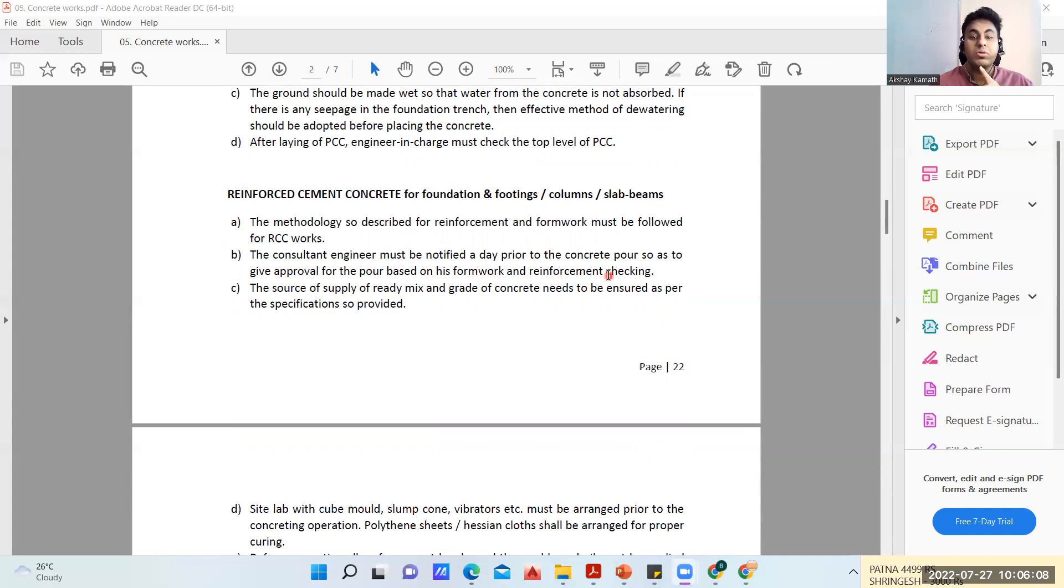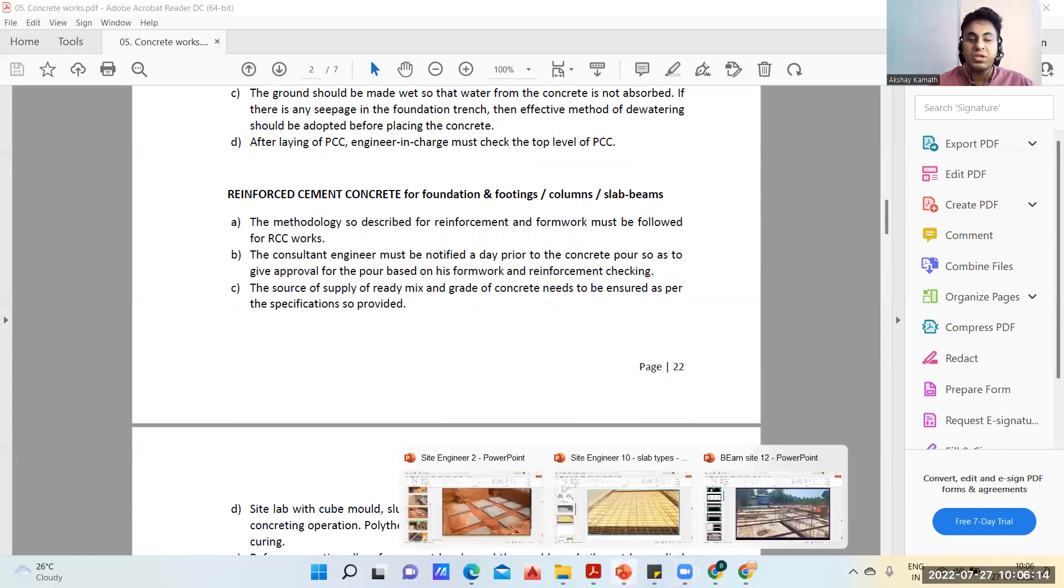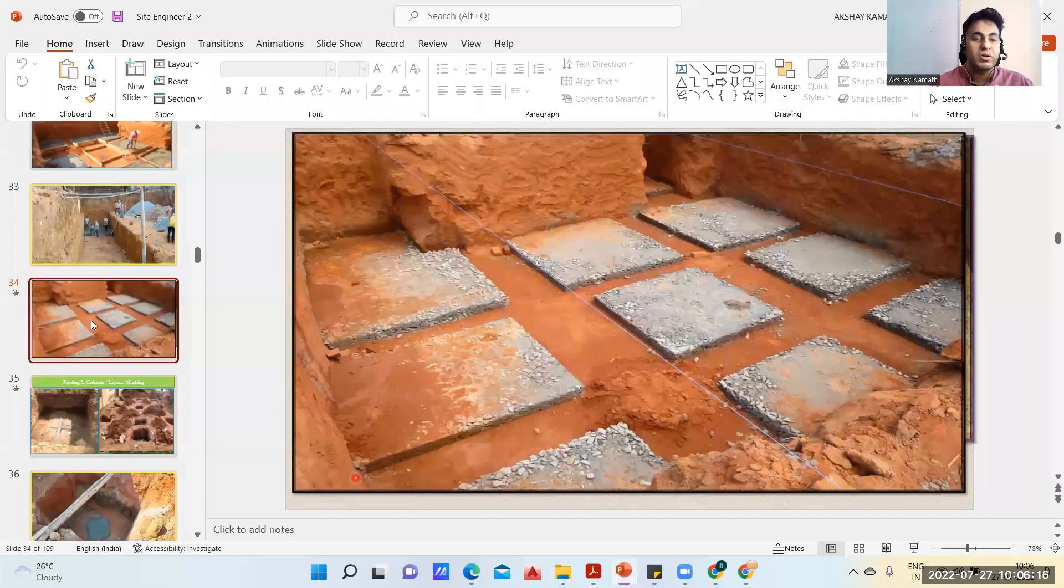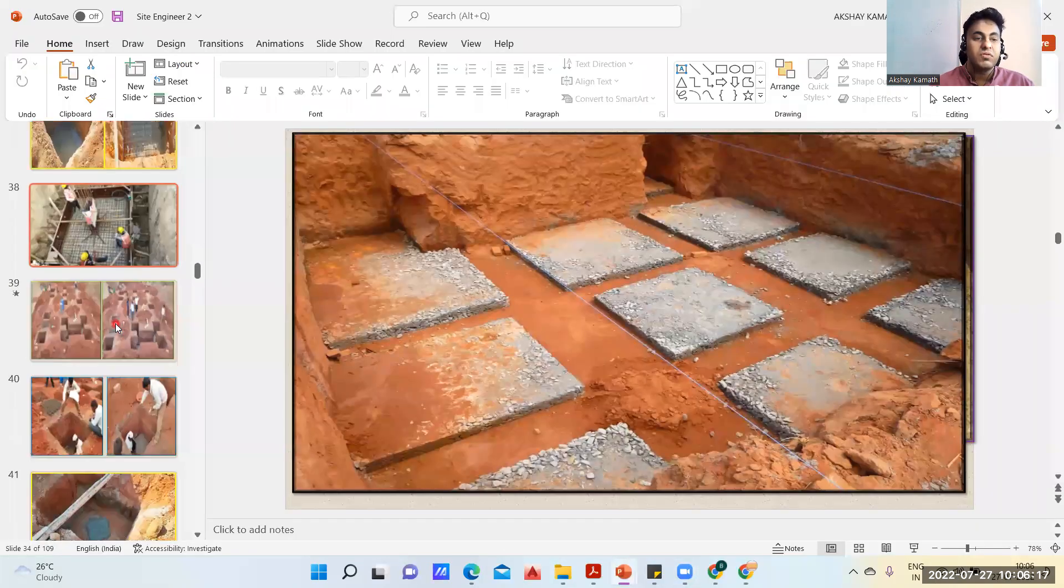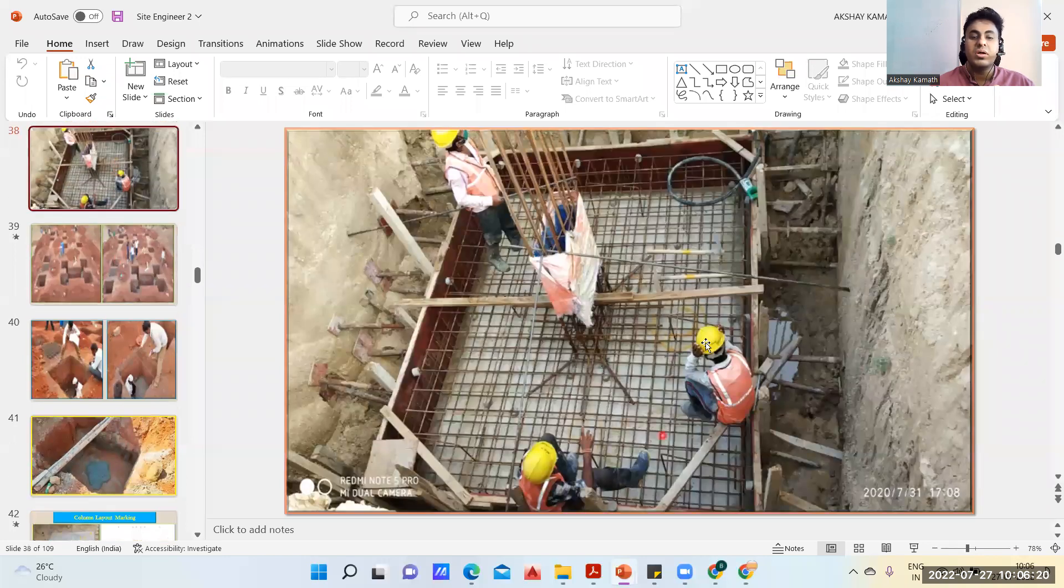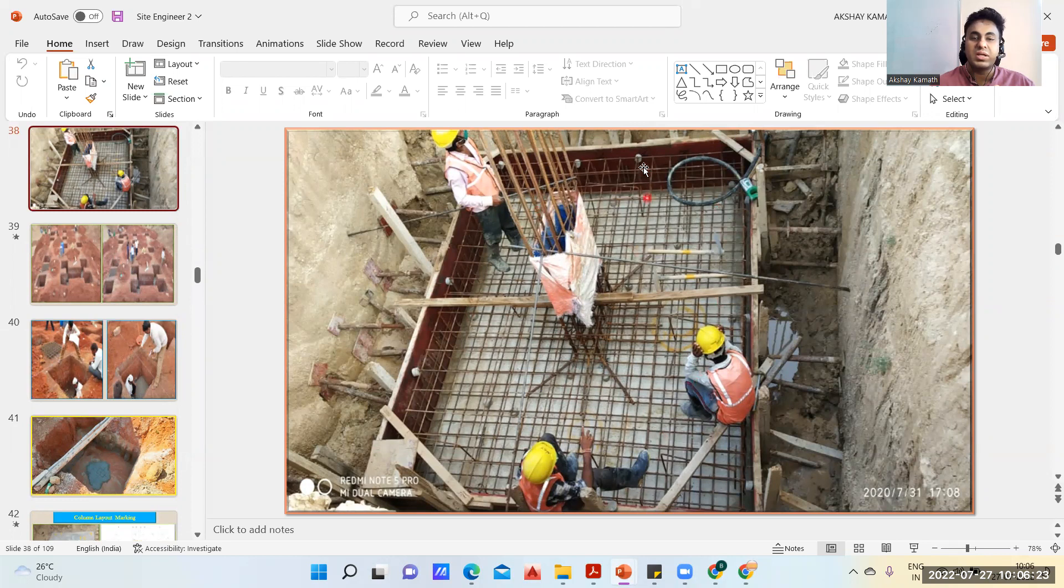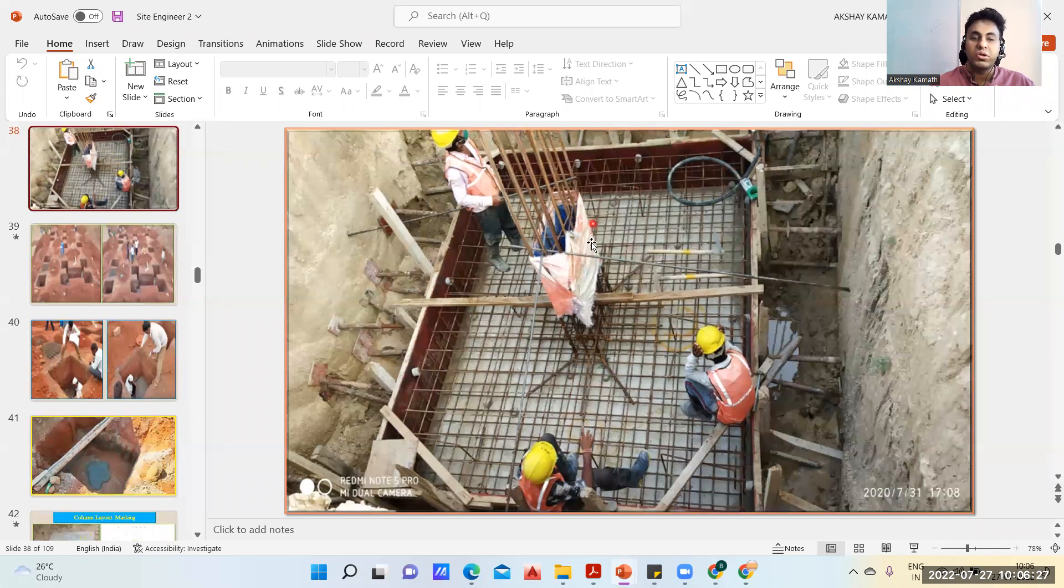The methodology for reinforcement and formwork must be followed for RCC work. The consultant engineer must be notified a day prior to the concrete pour so as to give approval for the pour based on his formwork and reinforcement checking. If tomorrow I'm supposed to do concreting work, one day before we'll give a pour card.